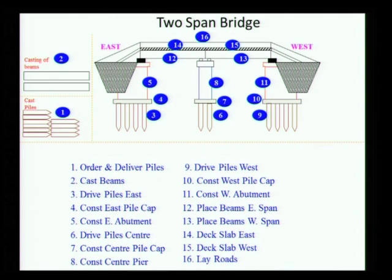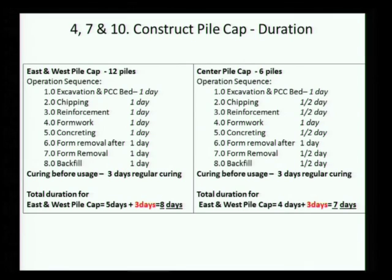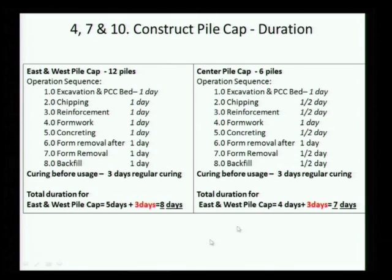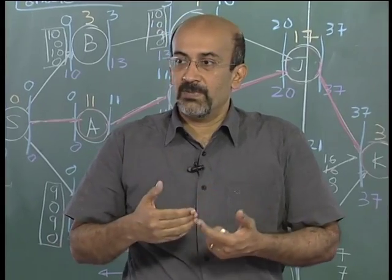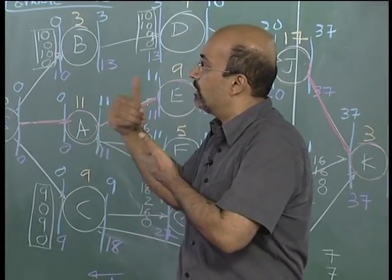Now, we go to the problem which we want to discuss, which is the two span bridge. You remember we had 16 activities in the two span bridge and we had actually talked about how to calculate the duration of these activities. For example, this was the construction of the pile cap. We talked about the various sub activities involved in the pile cap and then went on to calculate the duration.